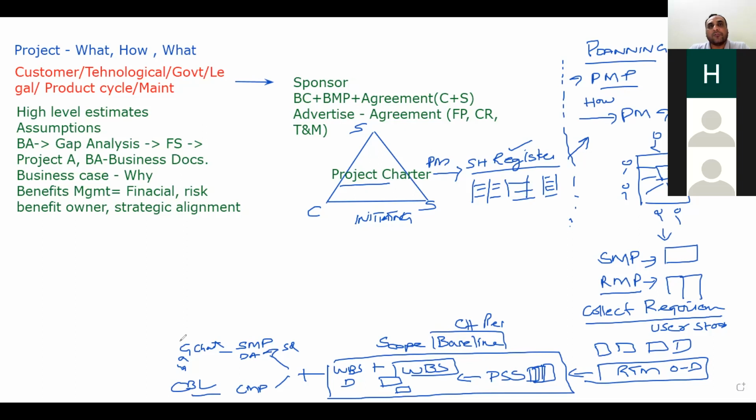Then while you are preparing for quality, you will make sure what type of working standards are required. Like if you are looking for 98.5, do we have the capability of producing a deliverable of 98.5? If not, we will spend on cost of conformance, like destructive testing, maintenance of the equipment or processes, or training, so we can make fewer errors.